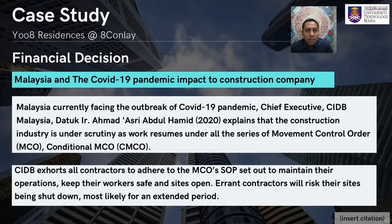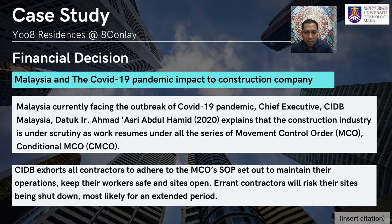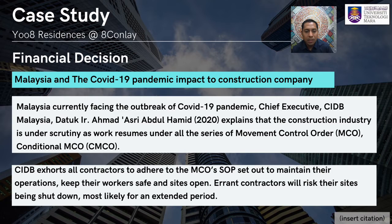Malaysia and the COVID-19 pandemic impacted the construction company. The whole world has been affected by the spread of COVID-19. CIDB Chief Executive Datuk Ir. Ahmad Asri Abu Hamid stated that the construction industry is under scrutiny as work resumed under the movement control order. CIDB exhorted all contractors to adhere to MCO SOPs to keep workers safe and sites open — contractors risk their sites being shut down for an extended period. CIDB in collaboration with the Ministry of Works launched instructional videos through CIDB TV on 10 new normal SOPs to be practiced by construction projects.